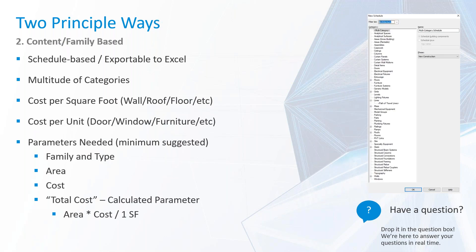Our second principal way is our content or family-based schedules. This is also exportable to Excel, and there are actually a few more categories in this type compared to a material takeoff. When talking about something such as a wall, roof, or floor, we typically want to consider cost per square foot. You can also consider cost per cubic foot if you are working in volumetric calculations such as concrete pours. There is also cost per unit, which comes into play when talking about doors, windows, furniture — kind of one entity that you can physically pick up.